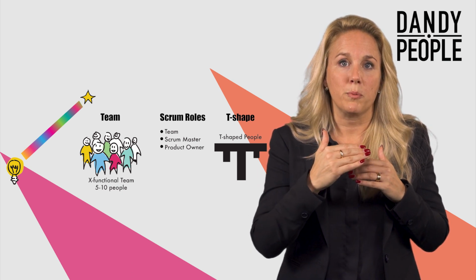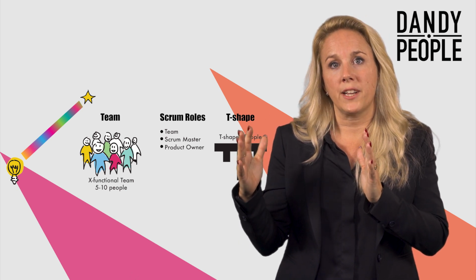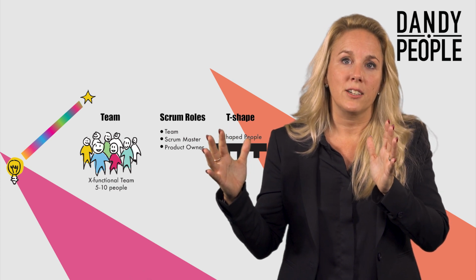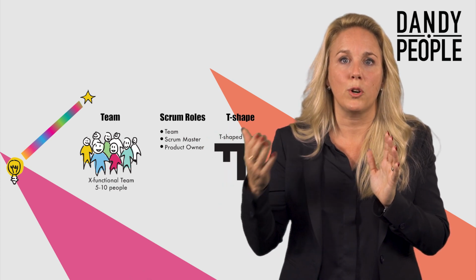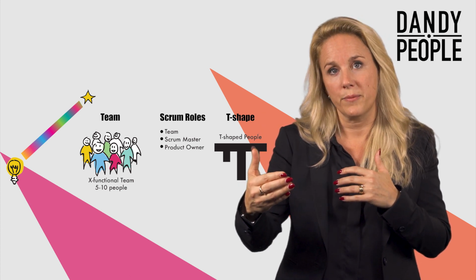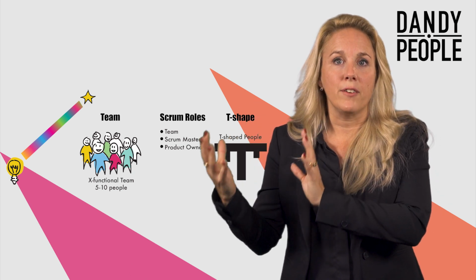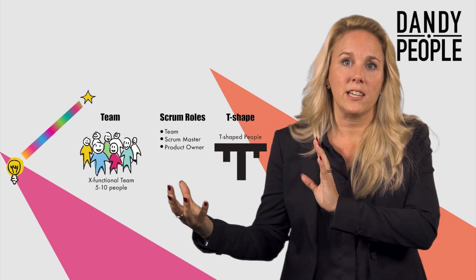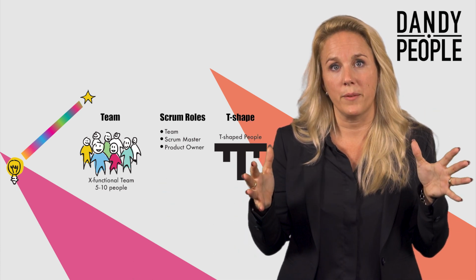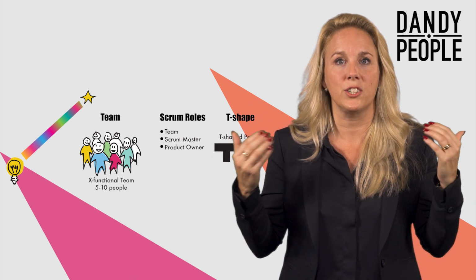And when something is prioritized and taken into a sprint, the team works on that in 1, 2, or 3 week sprints and continuously delivers value and learns more about what the value is in connection to the customers. At the end of the sprint, we deliver and have a demo, and we also get learnings on how we can improve our process in Scrum. And of course, we celebrate that we did a great job and continue to learn.